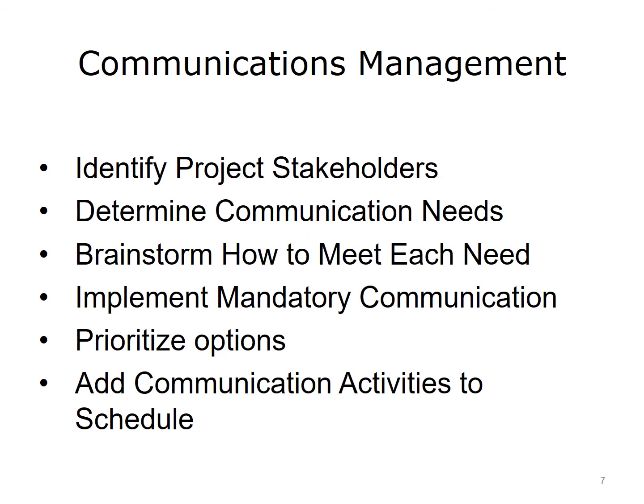5. Prioritize the remaining communication options. Determine how much effort is required to create and distribute each of the communication options identified in Step 3. Determine the potential benefit of the communication to the recipient and the project team. Once you have completed these actions, prioritize the communication options that you have identified. Implement the communication options that provide high value and require low effort from the project team. Discard options that are high effort and yield little benefit. Also, discard the options that provide little benefit, even if they require very little effort from the project team.